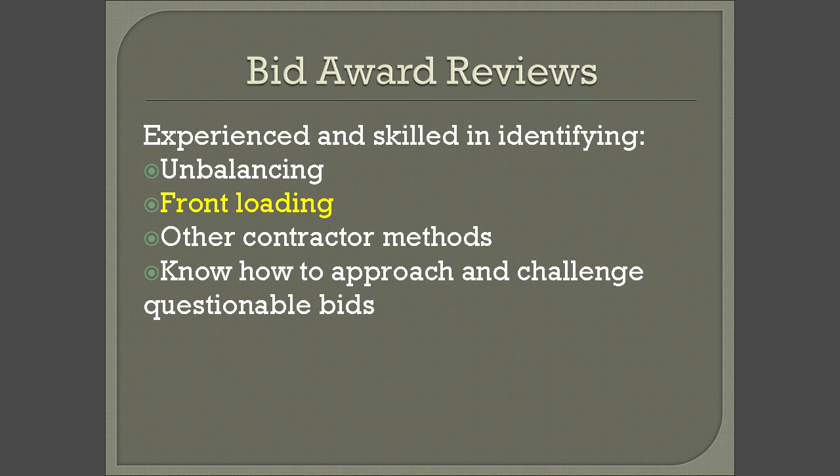We notify the construction and the designers and tell them, why don't you check your quantity one more time to make sure this quantity is right, is not overrunning. Front loading. Contractor loves to work on UDOT money. Why should we spend our own money and wait for the pay estimate number one so we can go cover that cost? So they put the money on the items, the front items.